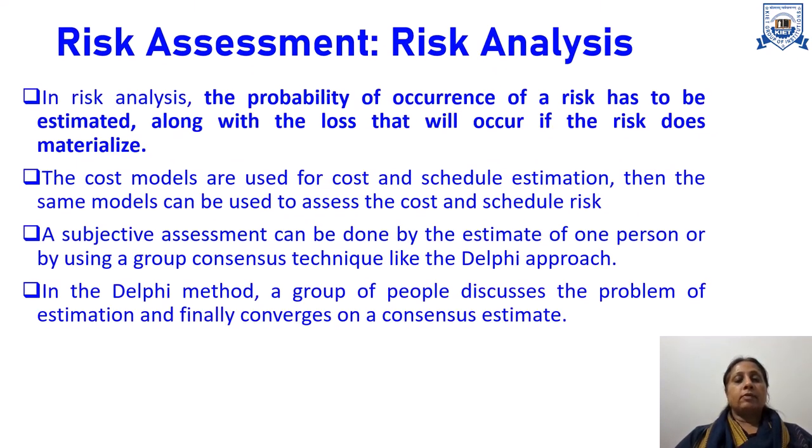After that, we will analyze the risk. In the risk analysis, the probability of occurrence of the risk has to be estimated along with the loss that will occur if the risk does materialize. What will be the probability? What will be the loss if this risk occurs?